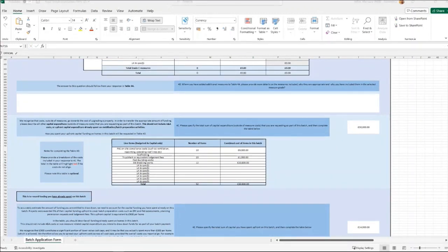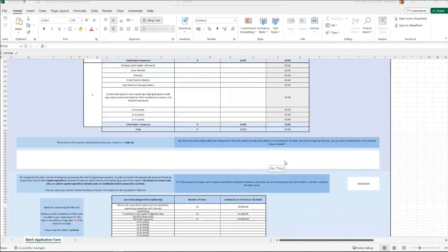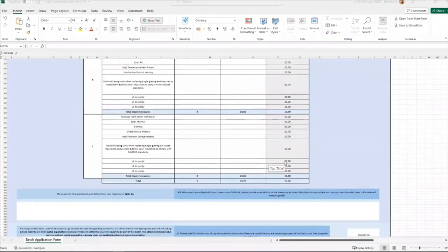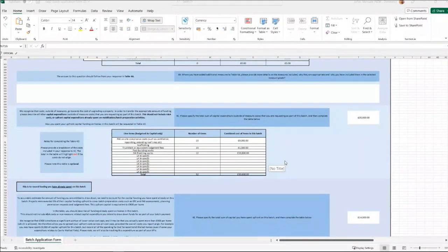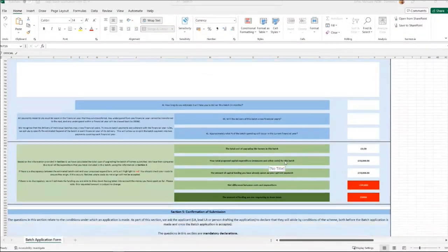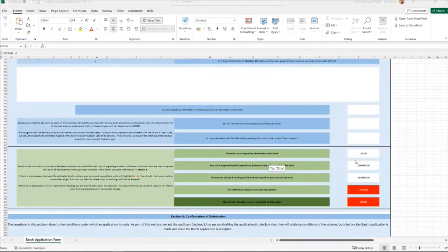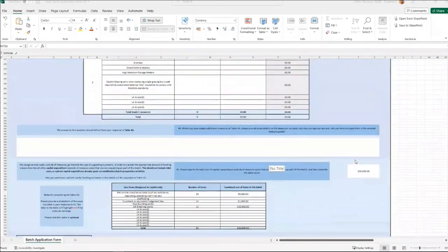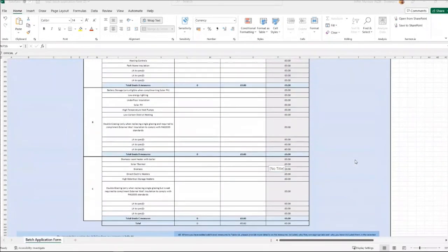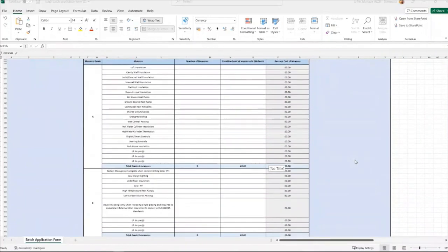Based on those costs, we can then go and also fill in the measure costs. So we calculated off the back of this from the total amount of money that we would be entitled to, that we have a net loss, or we've already spent £44,000, or there'll be £44,000 less of measures that we can receive for these properties. So then with our measure costs that we got after that, we can fill that in as well.